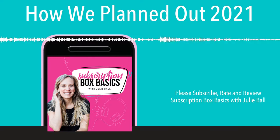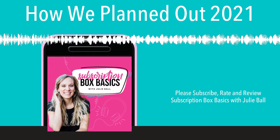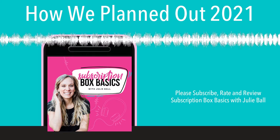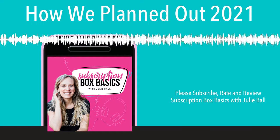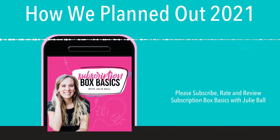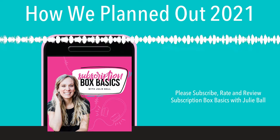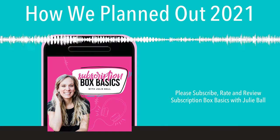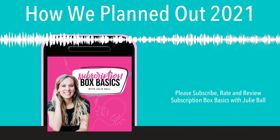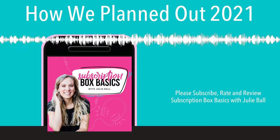So Amy then took those pictures and created a new project in Basecamp for us called 2021 Monthly Boxes. And in each to-do list was a different month. So picture it like January 2021, here's the to-do list. And she broke down each category as a different task. So the book, the office supply, the theme, that type of thing, all in this to-do list so that we could start sourcing. And then after that, she assigned all those products to me because I do the majority of the actual sourcing, when it's negotiating with vendors or if it's creating a custom product.